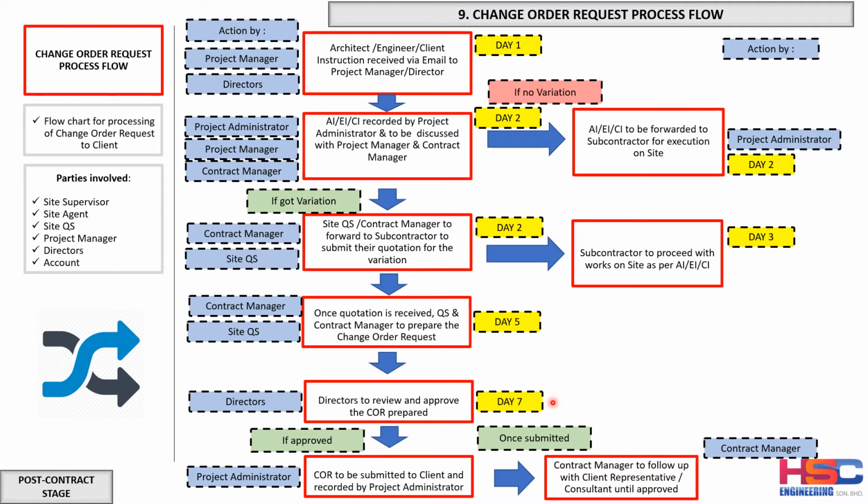This is important, and this information will need to be kept properly by the project administrator and passed to the planning department in HQ in order to apply for the extension of time. So all this record needs to be done properly, and the planning department and the technical department, as a functional matrix in HQ, follow closely on this to support the project in terms of EOT application.